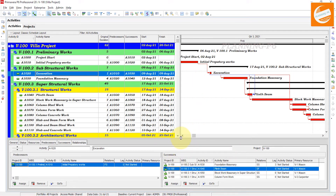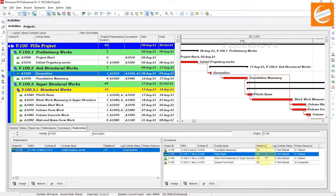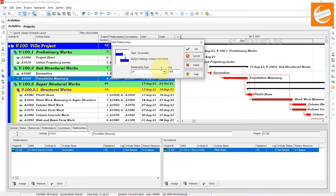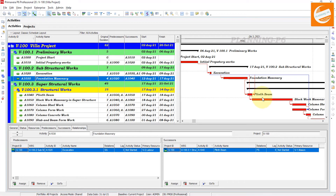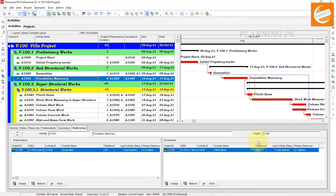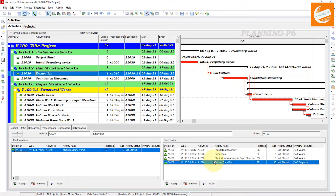Here in the relationship tab you can also see the relationships that have been assigned. With the same method, click on it — after the dialog you can change the relationship types and add the lag, whatever you want. This is how you can add relationships manually and manage your lags between your activities. After adding the lag and relationship you can just schedule it, and after scheduling you will see the behavior of your schedule.